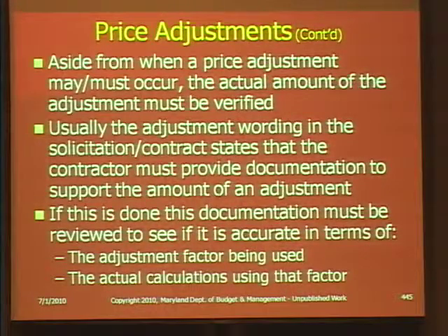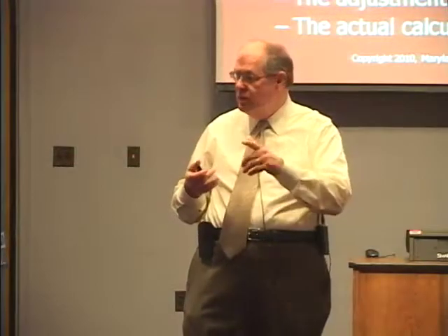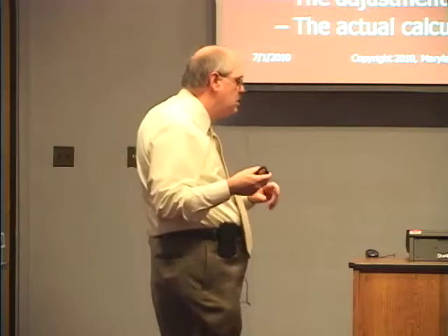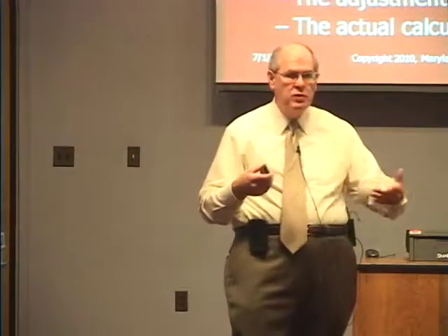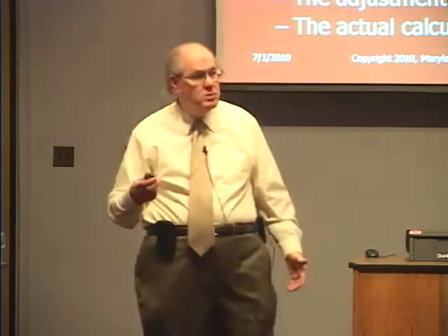Can't do it. That is that constitutional prohibition about giving a vendor more money without more deliverables not in the contract. Otherwise, we are violating, what was it, Section 35 of the Maryland Constitution about you can't pay more money for an in-place contract without more deliverables. So the answer was no.